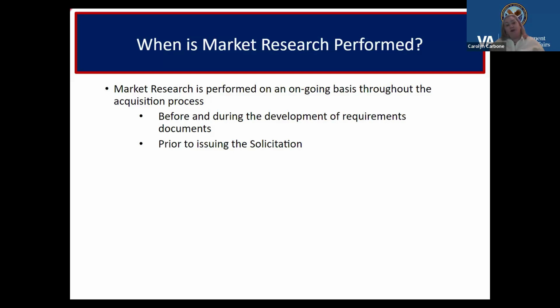So I like to think of the market research that you do during the development of the requirements as narrowing down the focus of what it is you want to buy. And then the market research that we do prior to issuing the solicitation really tells us how and where we're going to buy it. So it helps us to understand how we're going to set that acquisition strategy.